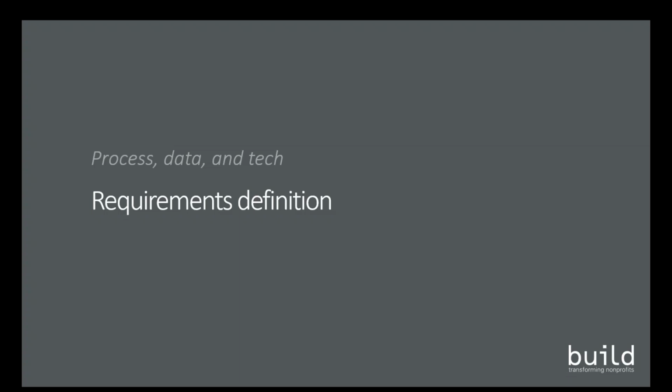When a vendor is engaged and the implementation is already moving, it can be very difficult, from a psychological perspective and a mechanical perspective, and costly for the organization to push the pause button. So you definitely want to get that business requirements definition done as a separate exercise before the selection of the technology solution.